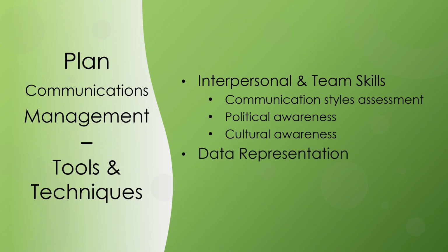Data representation. A data representation technique that can be used for this process includes, but is not limited to, a stakeholder engagement assessment matrix. The stakeholder engagement assessment matrix, for example, displays gaps between current and desired engagement levels of individual stakeholders. It can be further analyzed in this process to identify additional communication requirements as a method to close any engagement level gaps.